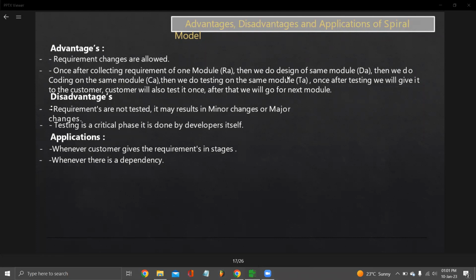in every next cycle, and you have commit a due date of that delivery of that particular project at 21st January. तुमको 2 ही 3 महीने बचा है, तो obviously you will not be able to complete that work in that particular span of time. So due to those requirement changes you should get a more amount of time in order to complete it, because eventually क्या होगा, अगर तुम time पे deliver नहीं करोगे they will ask you for fines and penalties and all that you shouldn't do, right?